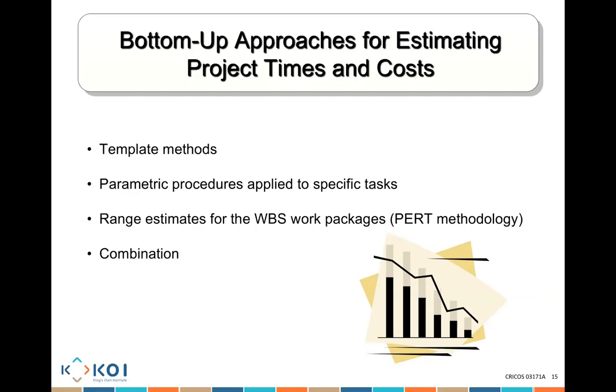So you say, I have 40 stories. For every story, we have 2 employees. So 40 times 2, that's 80 hours of work. Multiply $100 per hour. That's $8,000 I need for that specific job or for these 40 user stories that I would like to create.